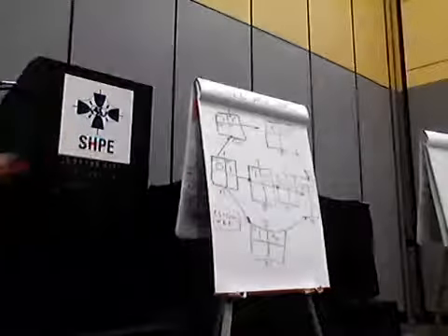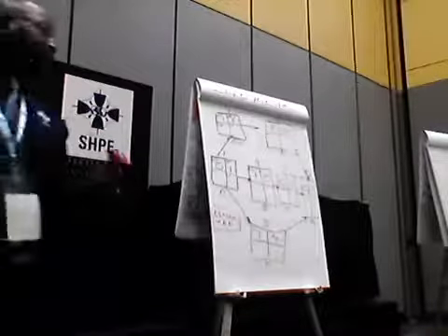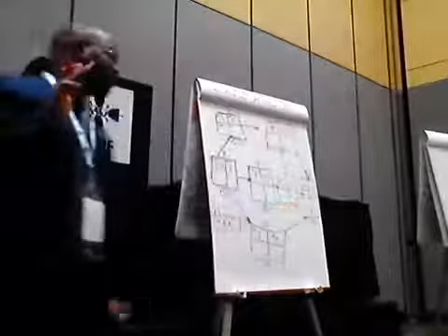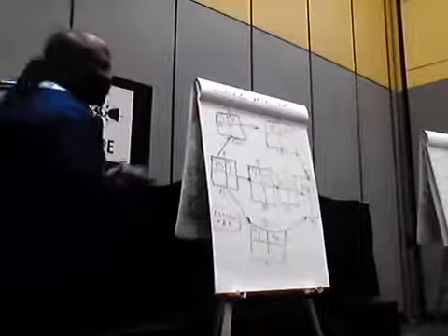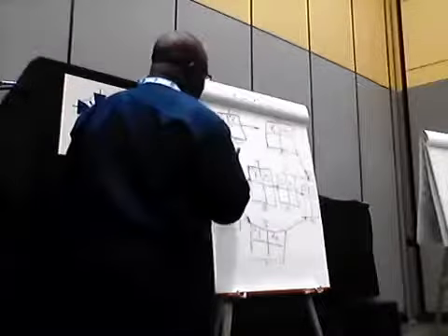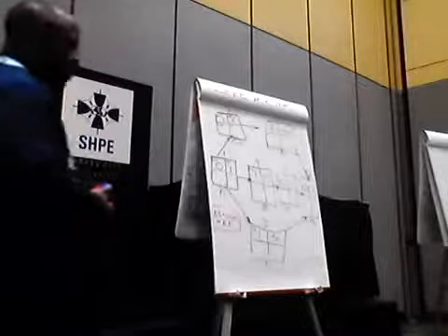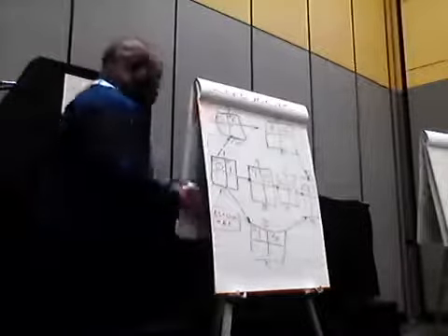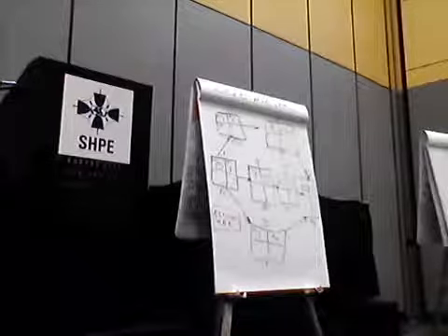What will go here? 17, great. This, folks, is what we call a forward pass. You're going from here on the right to the left. Or if you're looking at it like this, from here to here. Okay? That's your forward pass. What you've done is you found the early start and the early finish of all of the activities. Okay? Next thing we're going to do is we're going to take a look.